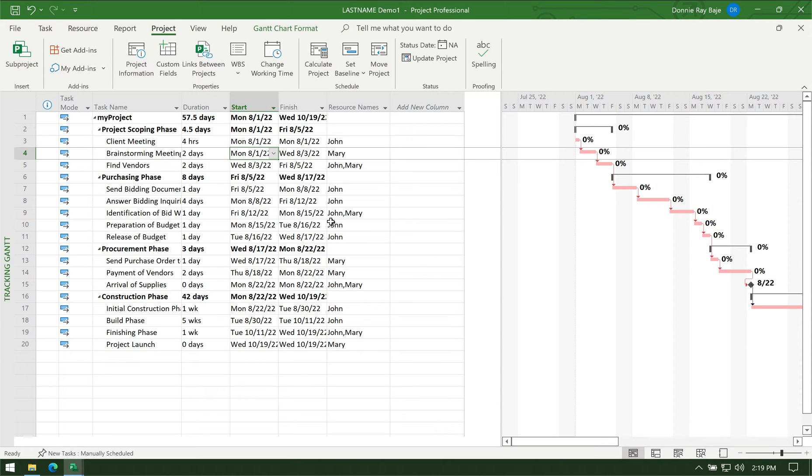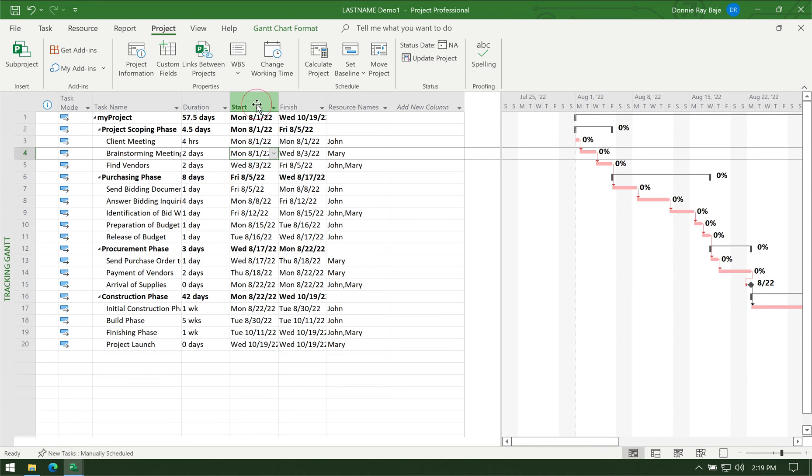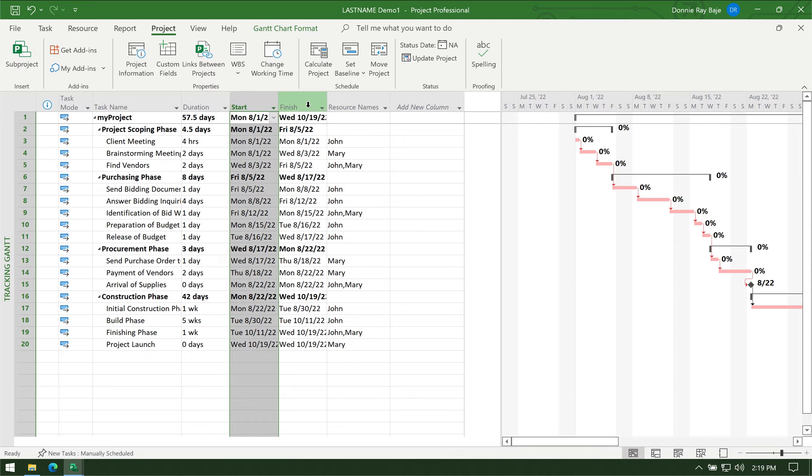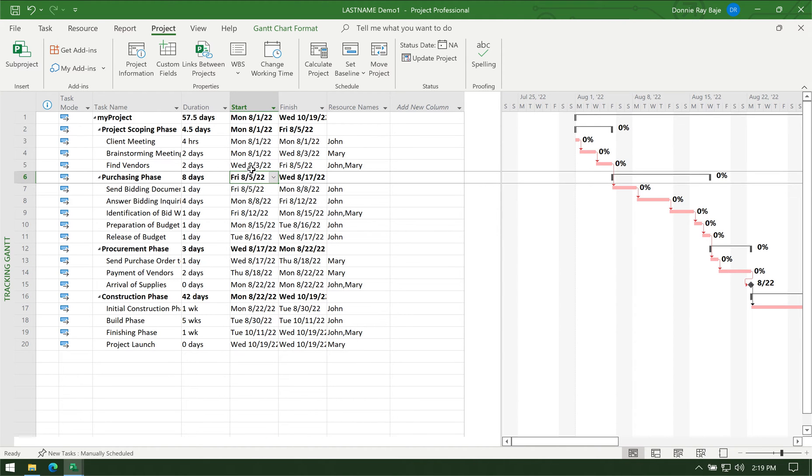First, you have to make sure that you have your target tasks. Here I already entered my project together with the target start and target end. Once you've set your targets, you then have to go to the Project tab and then go to Set Baseline.